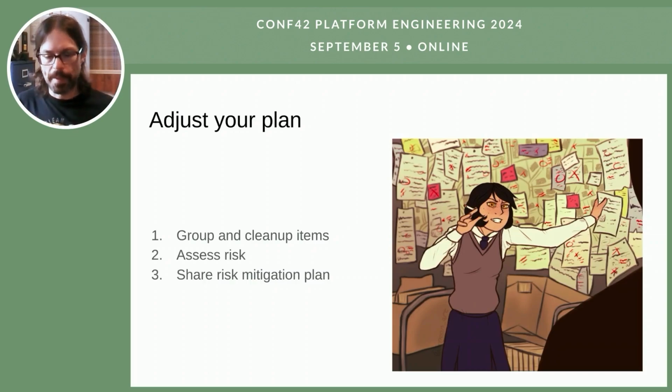So you group and clean up items. If there are things that were not clear or you don't remember, it's fine to go back to the people that brought the idea. If you remember, you can clarify. But the goal is to have a clean list of items. Then you assess the risk of each of them.